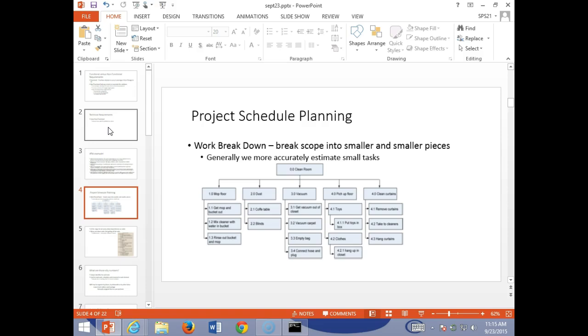And so here again is our work breakdown structure. And just to go over this one more time so everybody's got it, those numbers are how we sequence things. Because we're going to do a lot of stuff in Microsoft Project, Microsoft doesn't order their numbers quite the same way, does it? It just gives you a unique number. But our project charter and our project breakdown generally will be this way. And this gives us a very quick way when I see a number. So if I see 3.4, I know that it's in section 3, and it's the 4, at what level of work breakdown we're talking about.